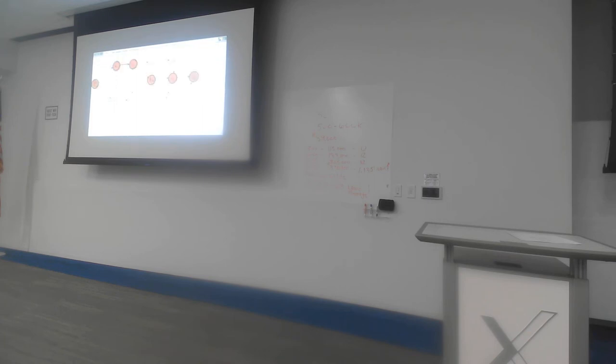The next path I'm going to look at is A, C, E, H, and J. So I need to count that one as well. So again, I'm going to go back to my table and fill that in. And again, count up the normal duration of that path. 2 plus 3 is 5, plus 10 is 15, plus 1 is 16, plus 2 is 18. 18.